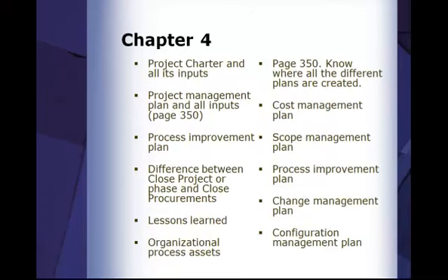So talking about chapter 4, don't just take it for granted, oh, it's integration. You do need to know about the perform integrated change control process, what actually happens when you get a change request. What do you do? If you get a verbal change request, remember the project manager should always get it in writing. Then the project manager should look at it. Then the project manager should send it to the change control board. Project manager may be on the change control board. Change control board looks at the change request and either accepts it or rejects it.